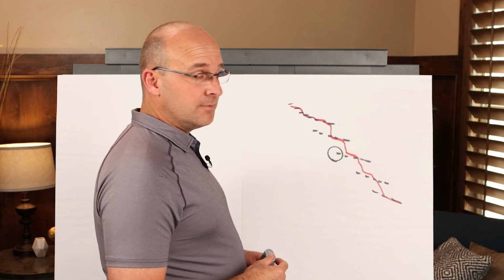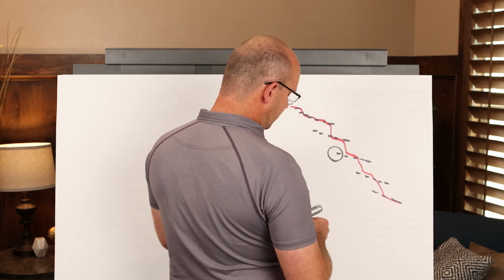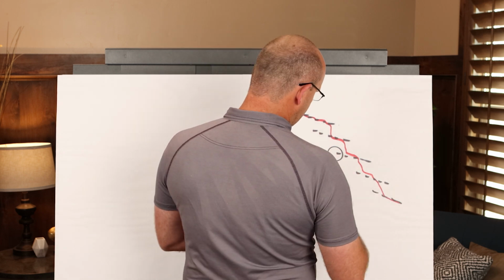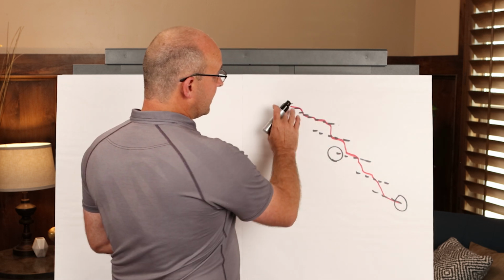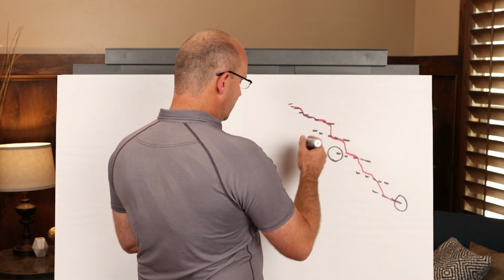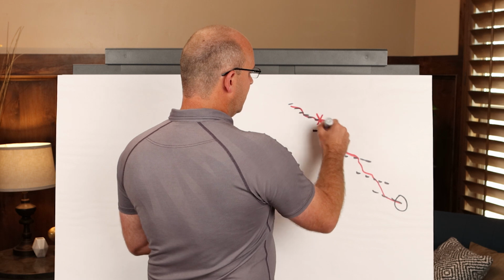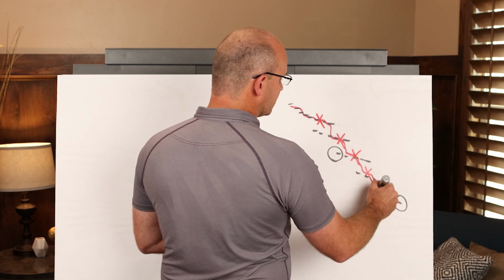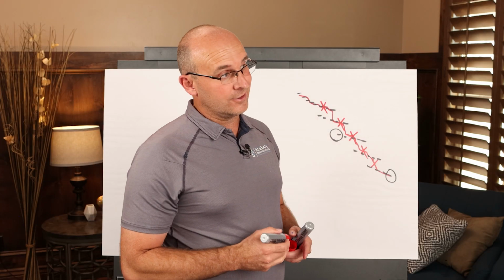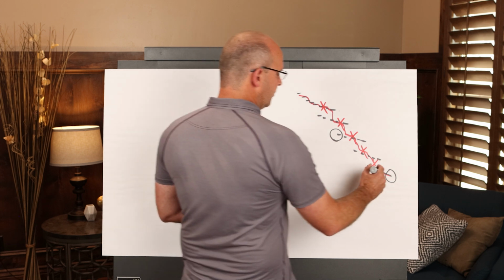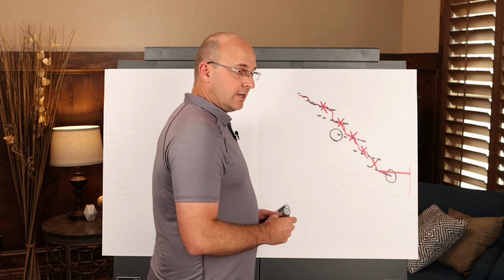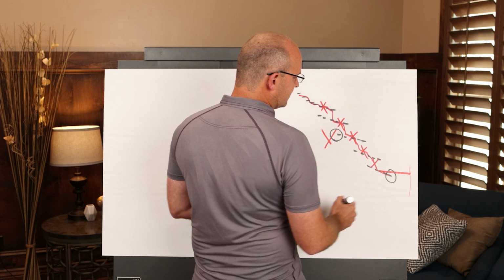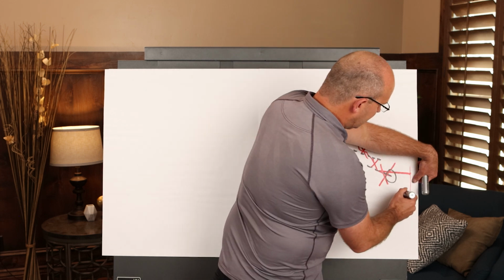You cannot submit an impact because it's not on the critical path. You also do not have buffers at the end of the production plan. And because there's a critical path with no buffers, you will hit delays along the critical path because this is construction. Common sense would tell you you can't have a perfect scenario. You will overrun and the owner will make it your fault. So they will not give you the time extensions, they will not give you buffers, and they will blame you